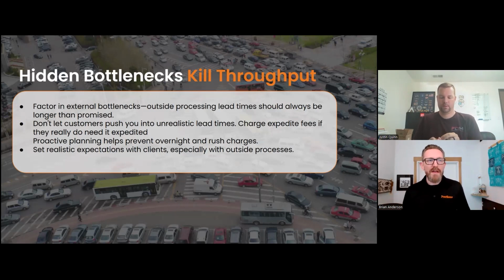If you have vendor A and vendor B and you send them both anodizing, you can measure on-time delivery, quality, non-conformances over time, and then decide who your best option is when timeline is critical.